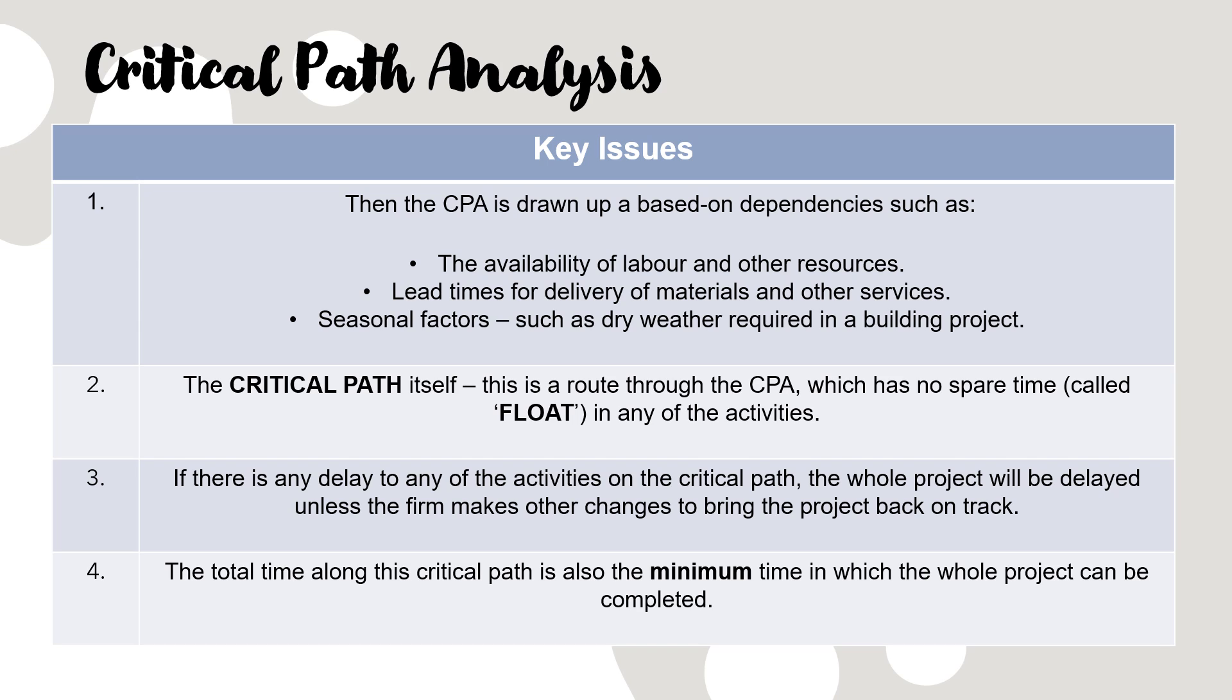Critical activities - no float, no spare time. Have to be completed in the minimum amount of time for the whole project. It's the longest route through the path. Look at point one there - it's based on dependencies. You're looking at when you're making your estimates of the duration, how long each activity is going to take - how long for deliveries of materials, labor, resources, seasonal factors. Again, construction projects - you might estimate something's going to take four weeks and you think the weather is going to be fine, and suddenly it rains for four weeks - you've got a problem.